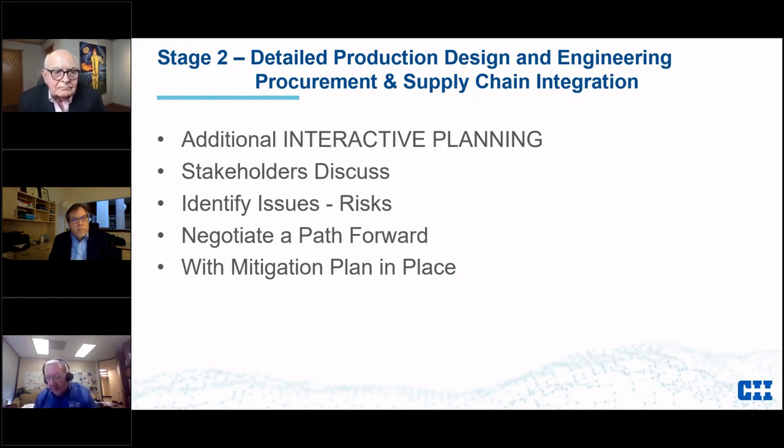Most people, when they talk about lead time, look at when it is going to arrive on site. One of our biggest critical issues is, when is my design team going to get the vendor data? I can't design that foundation without that vendor data. I need to know how big that pump is, where the bolt holes are, what the torque is on that pump, et cetera. So vendor data, 9 times out of 10, is the driving factor for me. Then that gets into your big milestone: when am I going to have funding to actually place this order? And in most cases in today's world, the funding to place the order is probably too late based on the lead time that I need for vendor data and or delivery.